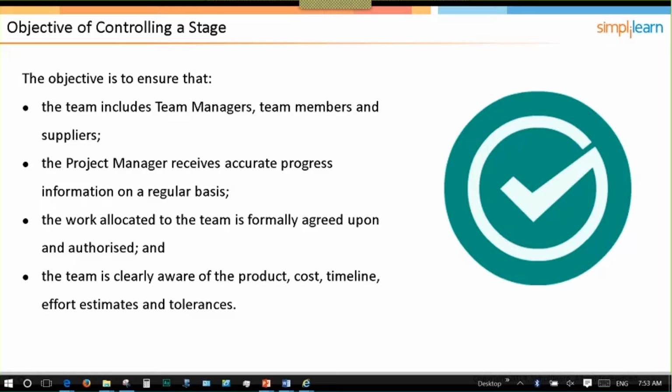What happens is the sprints or the delivery schedules that we generally keep are as small as 2 weeks typically, and that helps us to go back and re-baseline our plans. We keep adding those features to the backlog in the first place, and then change the priority of the backlog items in such a way that focus moves on to item number 3 first rather than item number 1, because we don't have the complete details on item number 1, which needs to be signed off by the client or by the issuing authority.